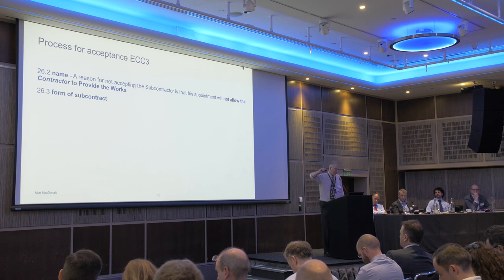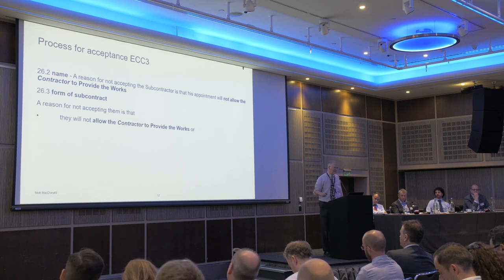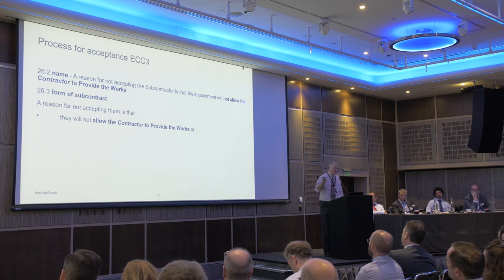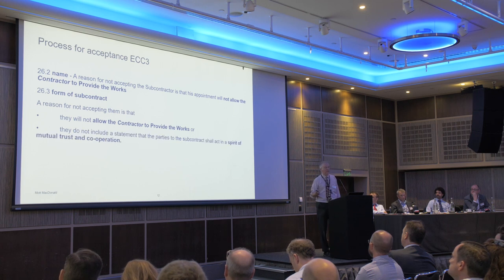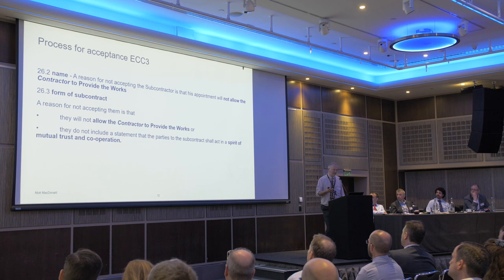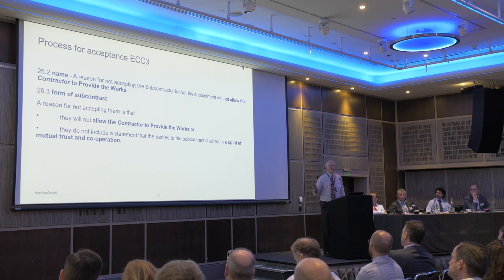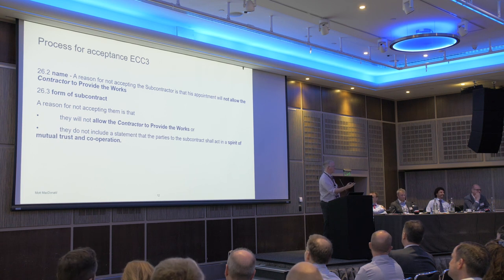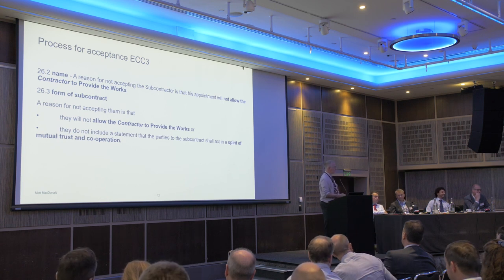We then go into the form of subcontract. The only reason for not accepting a form of subcontract is that it doesn't include that wonderful 10.1 statement. It's very easy for a contractor to patch in a 10.1 statement on top of his generally subby-bashing subcontract. Not that you contractors would have any subby-bashing contracts, obviously.